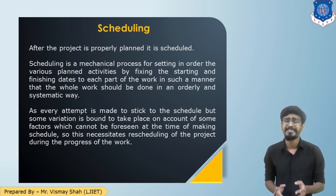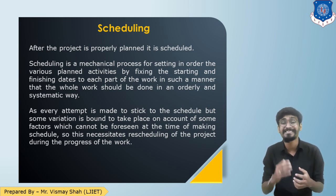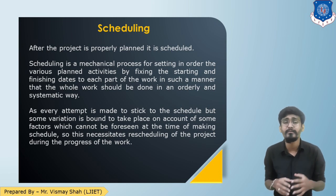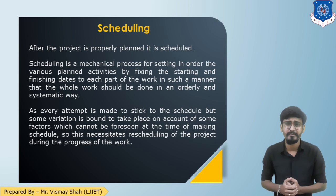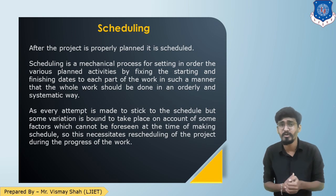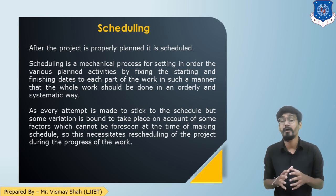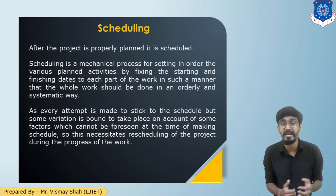Every time in a project, as an engineer or construction manager, our aim is to always stick to the schedule — we try to ensure all works are completed as per our timeline. However, some variations are bound to happen which are beyond our control and cannot be forecasted during the scheduling process. Therefore it is necessary to reschedule the project during the progress of the work, updating the schedule as per actual project progress.